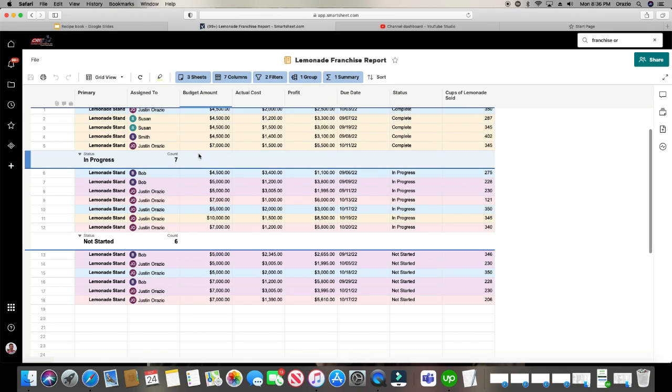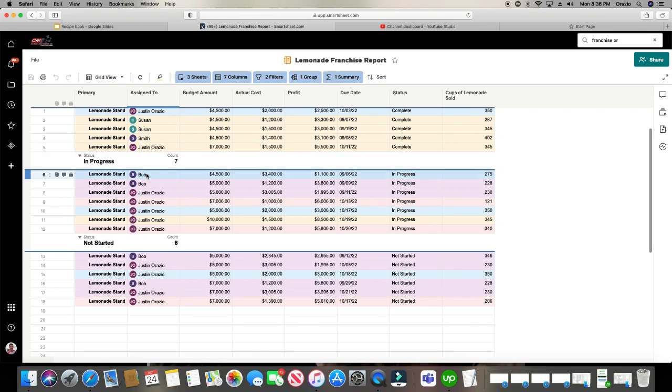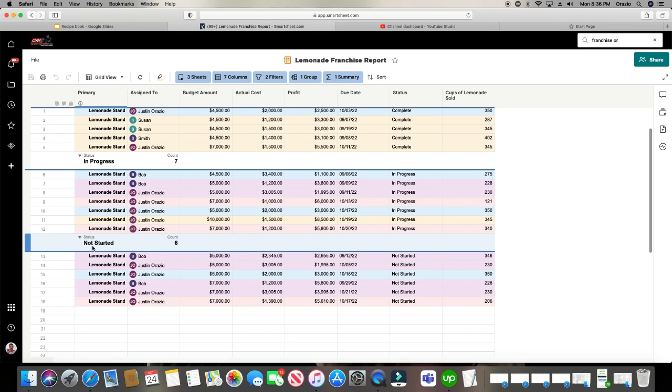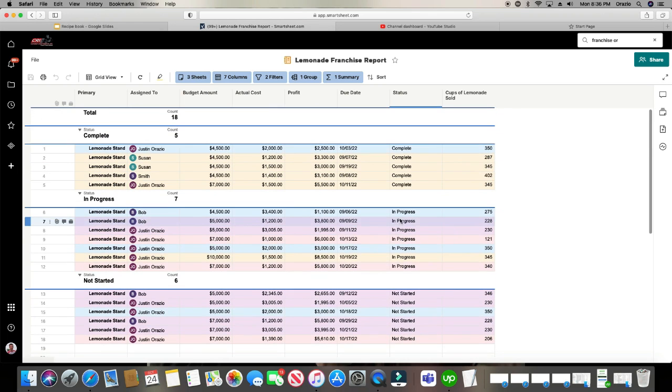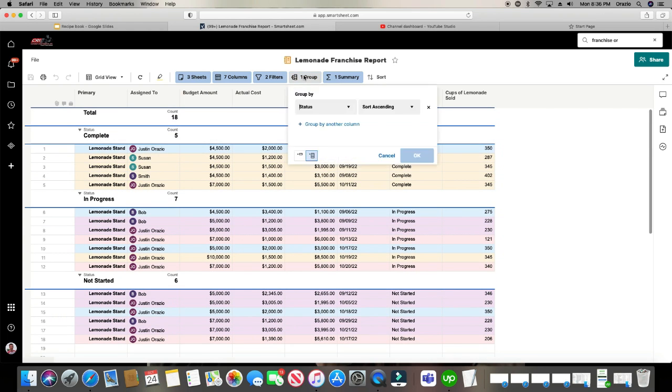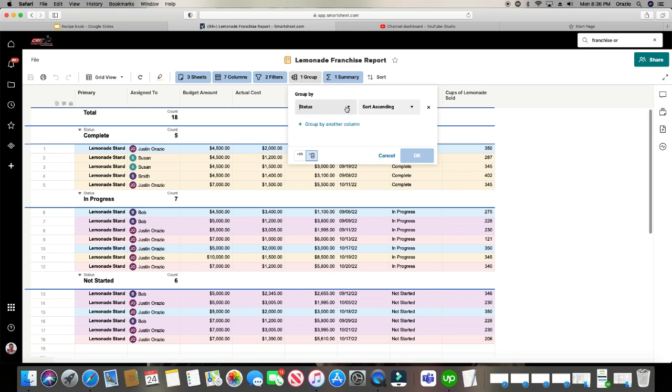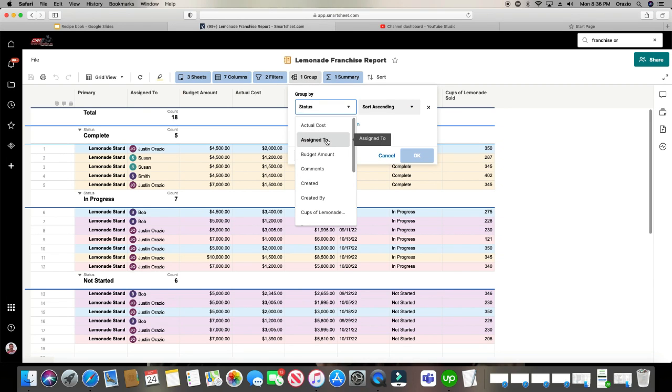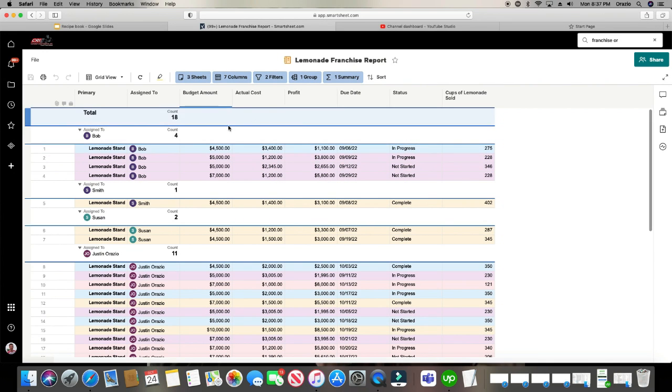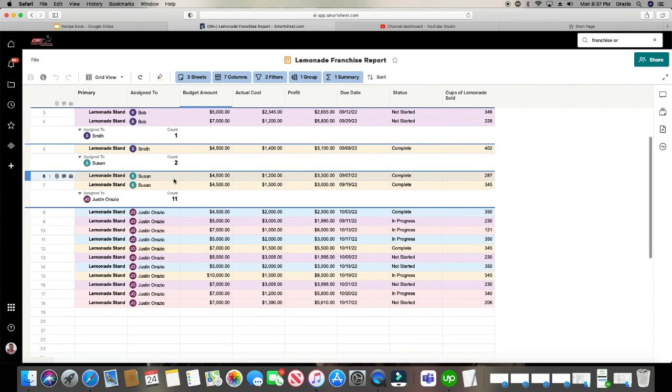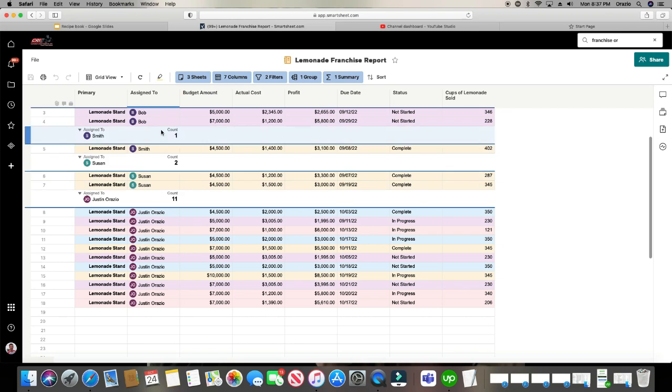So it's actually doing it per status. So let's change it because it's grouped per status. So right now it's counting per status. So there's six that have not been started, seven that are in progress and five that are complete. So let's change it from the group. So let's not group it by status, but let's group it by assign to. Click OK. Now it's doing the count by the assign to.